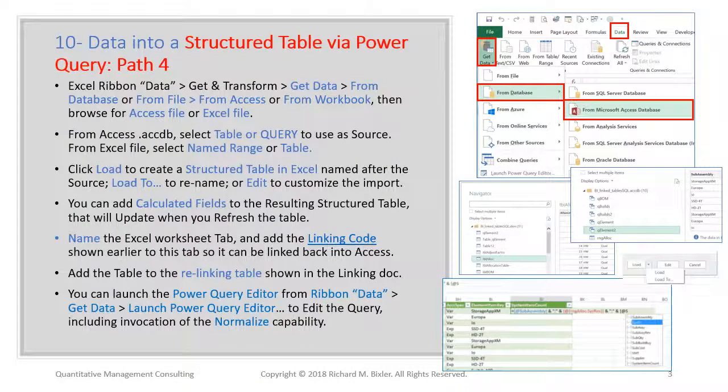You can bring in data from an external source, putting it into an Excel structured table using PowerQuery, as we described as Path 4. In a PowerOpI application, for example, you'll be using this to bring in the dates file exported from MS Project into Excel. You can join the resulting structured table with other tables for allocation and product structure BOM to connect dates to builds, integrations, and other scheduled tasks.